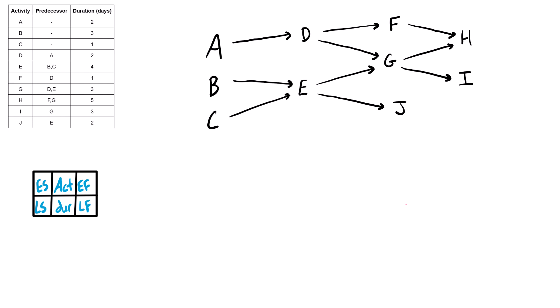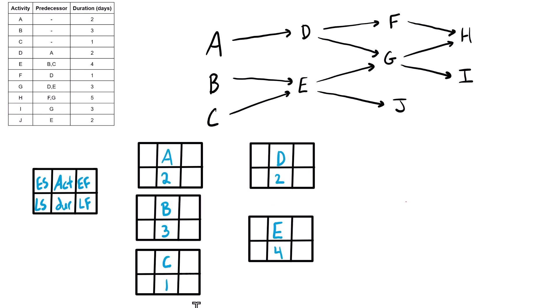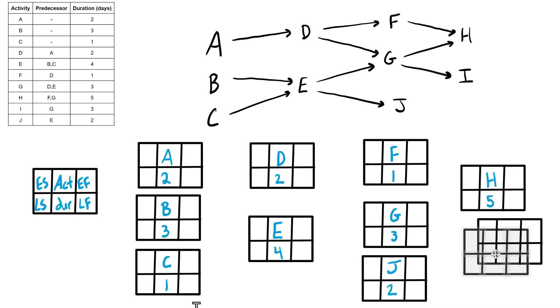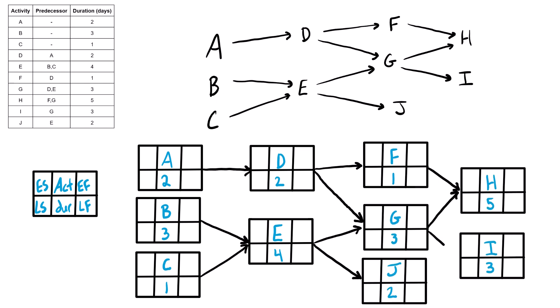Now we can redraw the network diagram in its final version using these squares as nodes and start filling out the early starts of each initial activity. For A, B, and C, the early starts are all zero — they're starting at the very beginning of the project. Adding the duration gives the early finish: zero plus two is two for A, zero plus three is three for B, and zero plus one is one for C.